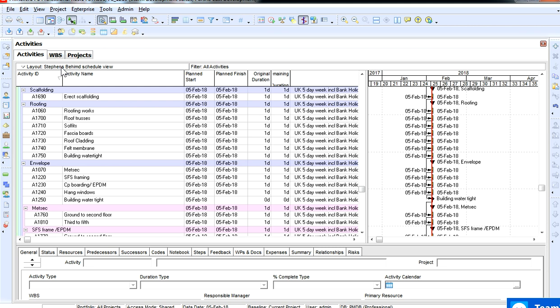Well, it was watertight from when it got to the roof, but once you've hung the windows, the building is actually considered as watertight. So you can start your internals, or you can start your rough plumbing, etc. Rough plumbing, MEP, rough mechanical, electrical, and plumbing. Okay, so this is all of the stuff that will go into the blockwork, right? Right the way up to 17 floors.